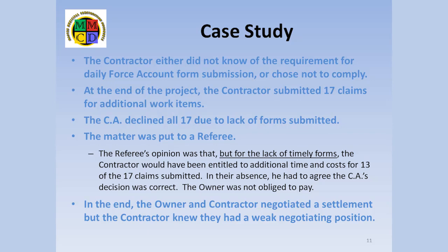In the spirit of fairness, the owner agreed to negotiate a settlement with the contractor, but both sides knew the contractor was bargaining from a weak position. The relative strengths of the parties would have been reversed if only the contractor had complied with the contract requirements to file force account forms daily.